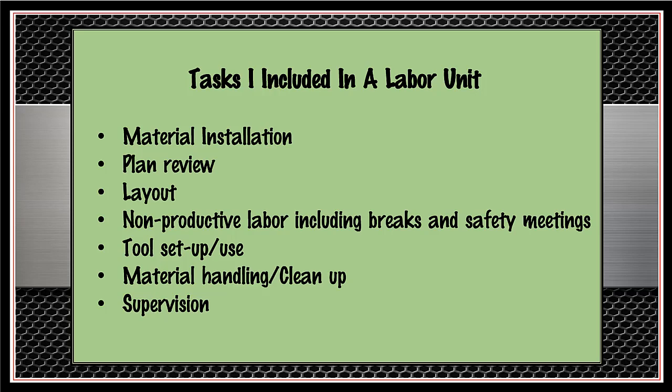It has also been my experience that if you make individual workers responsible for their own material on large projects, they tend to make a mess of the material storage areas to the point that they cannot find anything and end up squandering huge amounts of time trying to locate and reorder material that does exist but cannot be found. If you use a separate material handler, material handling should account for about 10% of the labor unit.